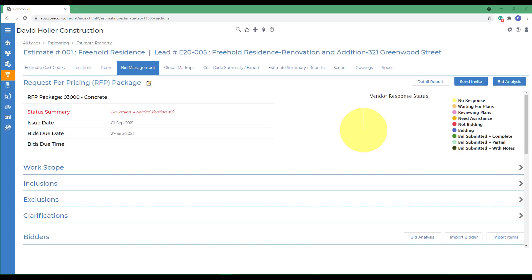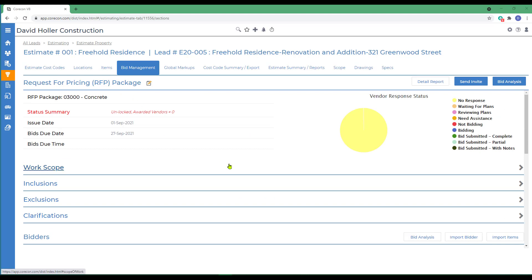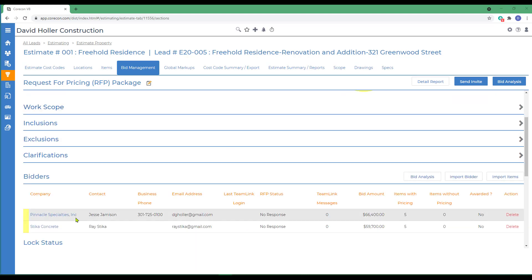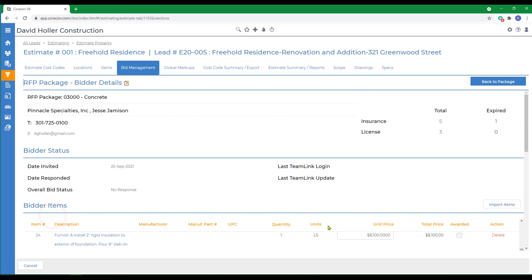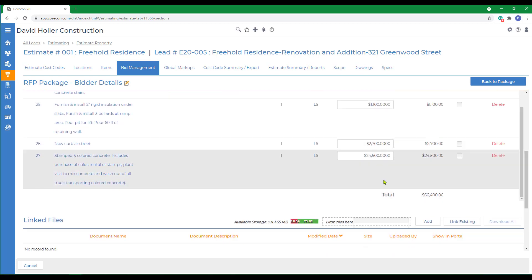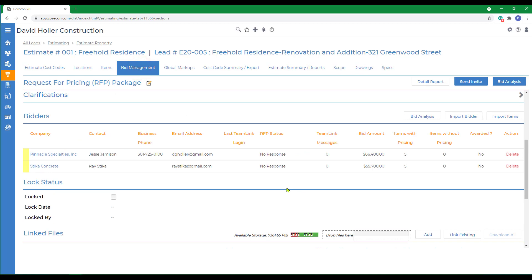Next, you'll wait a few days to see if your suppliers and subcontractors will respond to the RFP package. There's basically two ways to do that, one through the team link portal and one using the authentication method number one, which is replying to the RFP through an email form. Once they've replied, we come back to this RFP and the information will be filled in for you automatically. However, if you receive your response to the RFP in some other format, you can also manually enter those for them by just clicking on their name, scrolling down and just filling in the blanks back to the RFP.